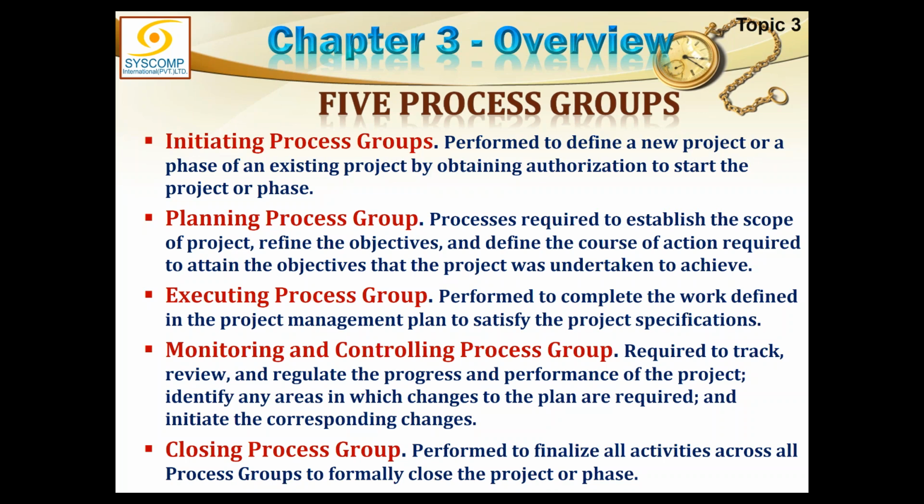Again, an authorization is created and a charter is developed for that. The charter is not only for the whole project, but for every phase we have to create a separate charter.